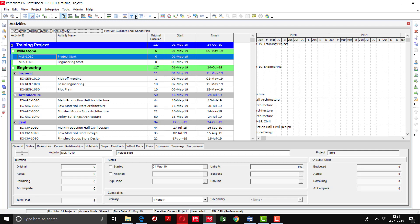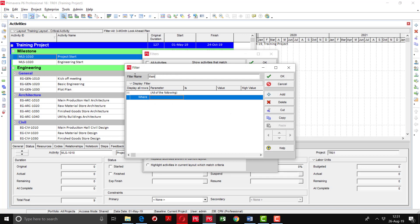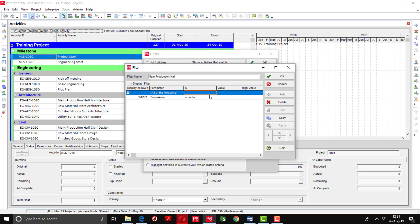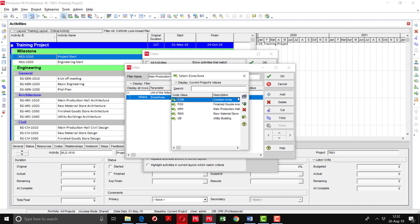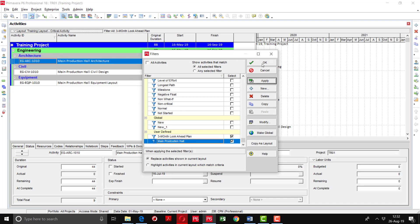Another layout I want to show you: if you want to see the zone area of the main production hall, I will tell you how to define that filter. I am going to create a new layout and write 'Main Production Hall' — I just want to see the activities of the main production hall. I know that main production hall is defined in zone area, so I will select the parameter 'Zone Area equals' and give the value 'MPH'. I will click OK and apply.